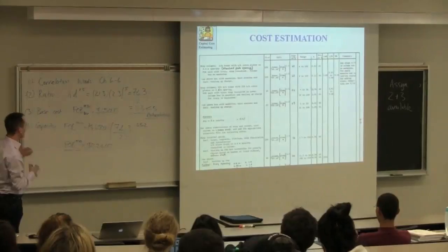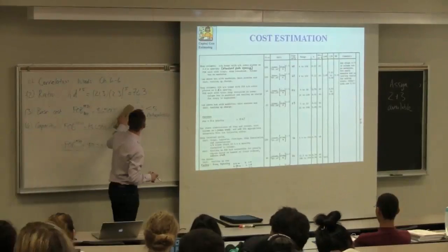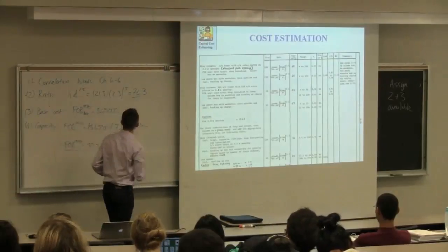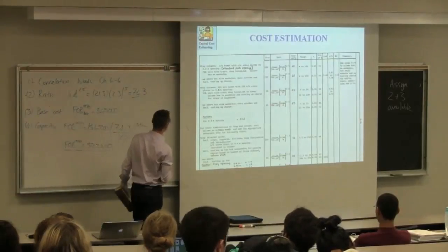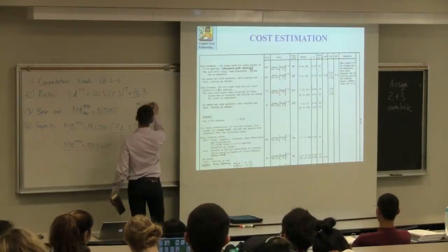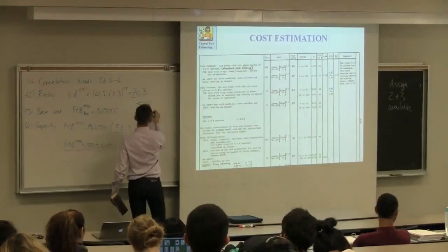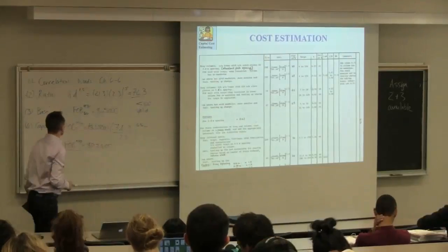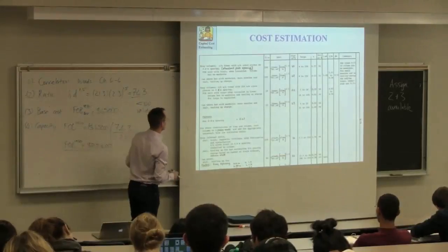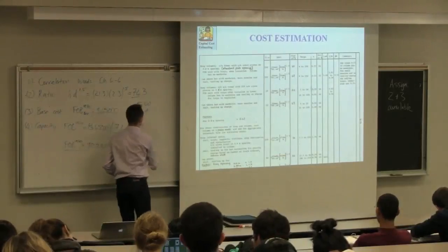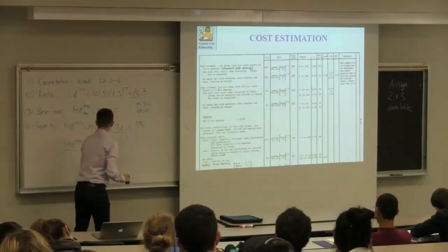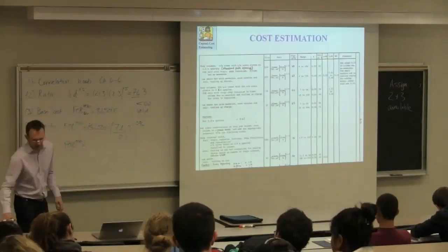So let's fix up what we did back to how we had it. So 74.3 was the base ratio. The base product was that, and it's within the range of 22 to 100. So it's below 100, so then, because it's in the range of 22 to 100, that exponent is 0.96. And our FOB price in 1970 would be as we had earlier.